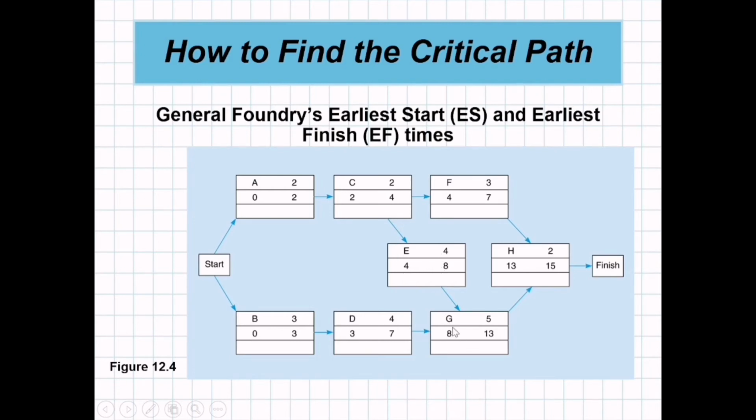For G, the earliest start is the earliest finish of the predecessor activity.